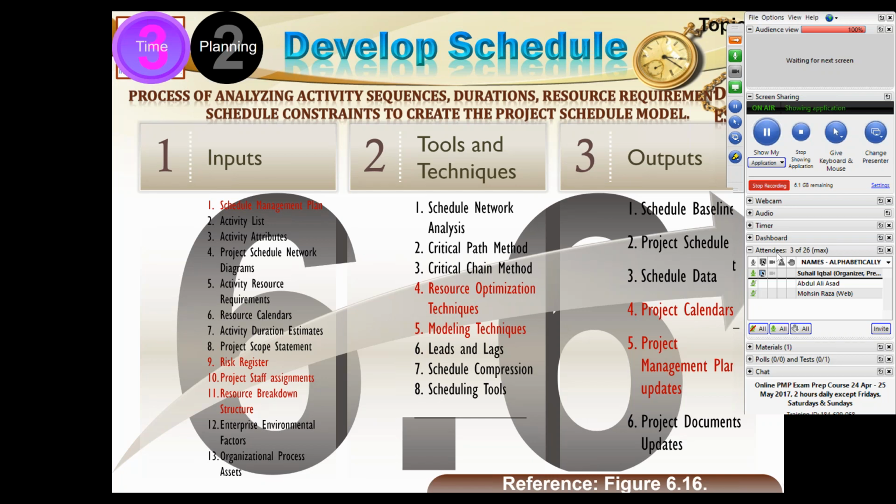We just talked about the critical path method. We just said that critical activities have no allowance. This is the breaking point. If a critical activity gets delayed, the whole project will be impacted. Therefore, this is the weakest area. Critical path is my weakest area.